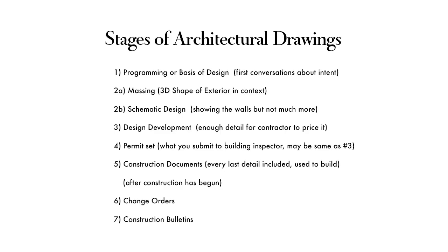But then once you're building, you're going to continue on with revisions, and you're going to have some minor revisions that you might call bulletins or addendum, or just straight up revisions, and those will continue throughout the project because the owner, whoever the ownership entity is, will make changes and desire to add things, take away things, save costs, add costs. And sometimes the bulletins will come out just simply because there were design misses, which is just part and parcel with the process.